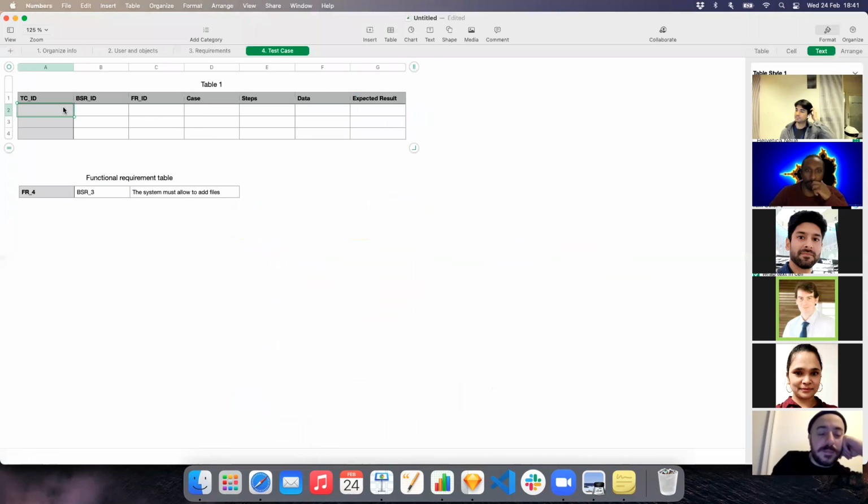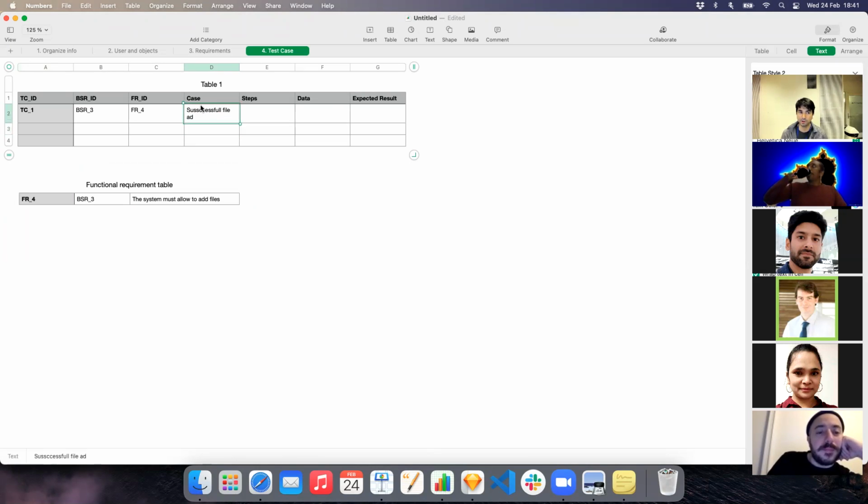So we need to say test case number 1, related to business requirement number 3, related to functional requirement number 4. Number 4, remember. We're gonna test successful file add. This will be my case. We're gonna test that we can add a link in the platform.